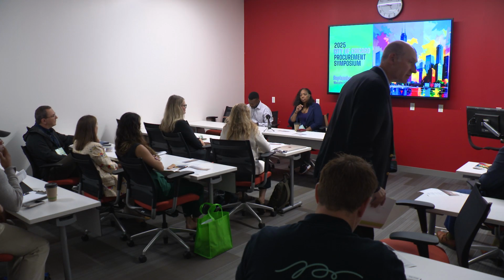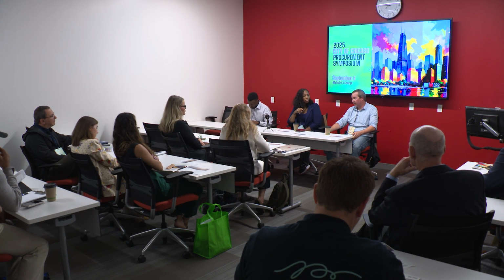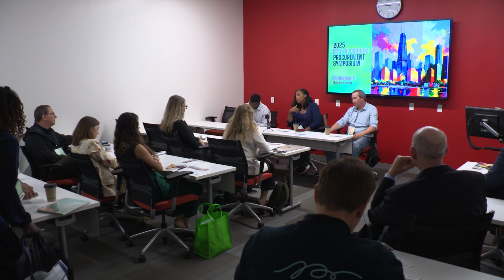Yeah. No, I can speak on behalf of Power. If you're going to bid any of this work as a prime direct to us, then you need to go through the pre-qualification process. If your intent is to work as a second tier, that's a negotiation between you and the prime contractor. So you would not have to necessarily be pre-qualified with us. Does it help if you are pre-qualified though? Not if you're going to bid us direct. Okay. Yeah, so same, it's the prime pre-qualification that is pertinent to us. We don't deal in the second tier.